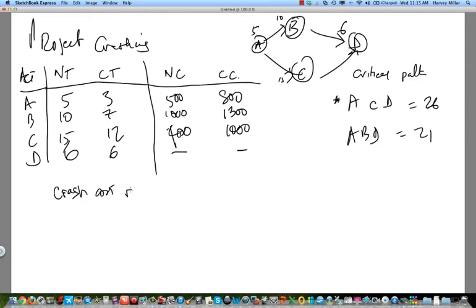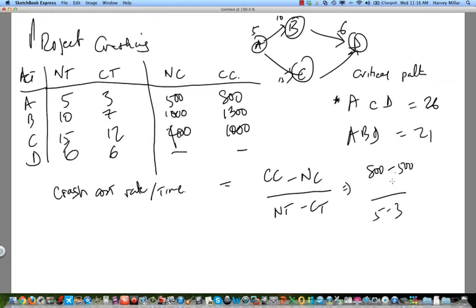So one of the things that we actually determine is the crashing costs, crash cost rate per unit time. So in this case, we will calculate that as your crash costs minus your normal costs divided by your normal time minus your crash time. So for example, for activity A, if we were to do this, it would be 800 minus 500 divided by 5 minus 3. So there's a difference of two days in here and a $300 difference. So $300 divided by 2 is $150 per week or per day or whatever the unit is.